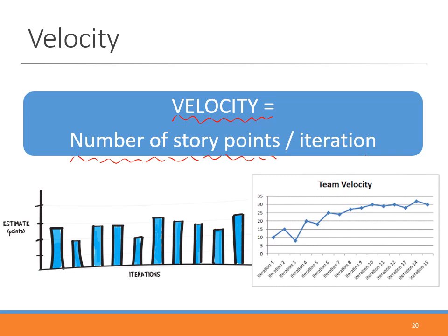So you need to estimate and calculate, right, that in each iteration, how many story points you can complete. And again, when we calculate and earn points, we can only earn the points of stories that we complete. Partially completed story or work is not counted.